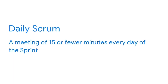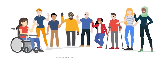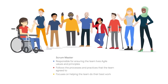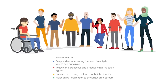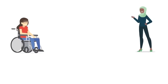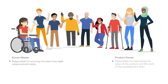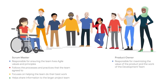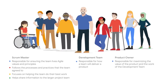There's also a practice called the daily Scrum, also called the stand-up. This is where the team meets for 15 minutes or less every day of the sprint to inspect their progress toward their goal. Next are the roles. The first is the Scrum Master, responsible for ensuring that the team lives Agile values and principles, follows the processes and practices the team agreed to, shares information to the larger project team, and helps the team focus on doing their best work. The other notable role is the product owner, responsible for maximizing the value of the product and the work of the team. The product owner owns the inventory of work and has the final say on how to prioritize it, while the development team is responsible for how the team will deliver that product.